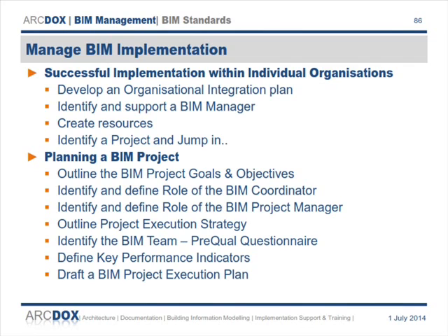If you are going to implement or be responsible for implementing BIM within an organisation, that whole process has to be planned. You can't just buy software, put it on people's computers and expect that it's going to happen. There needs to be a training plan. There needs to be somebody responsible for managing that whole process. You need to create resources. On a project where people are learning, you've either got to put more people on the project or give them a little bit of extra time on their first couple of projects. It won't happen the same. So you've got to create resources somehow for that project. But most importantly, you've got to start somewhere, and there's no point in waiting.